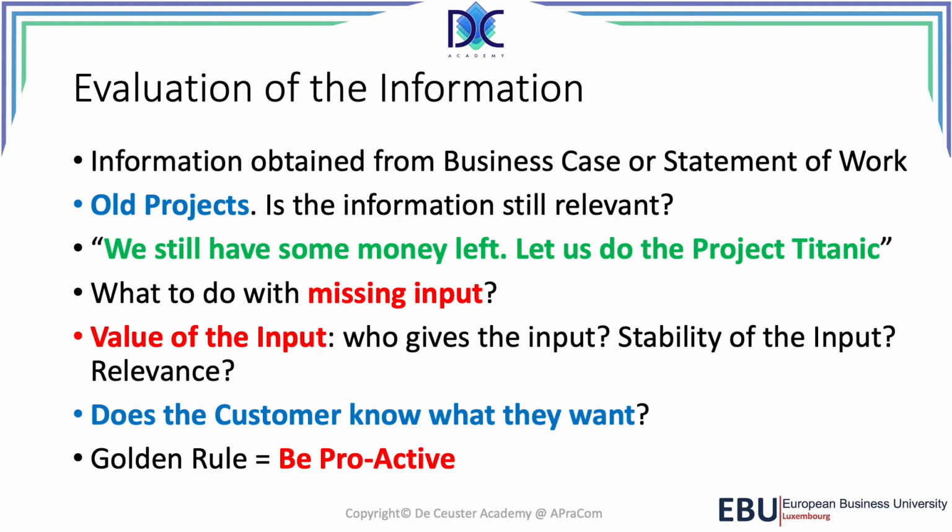Now, sometimes we have missing input, we need some input to start with the project. Many of my customers didn't give all the input necessary. The problem here was very simple. You just challenge them, you put there some information and you ask for their approval. Basically you make some assumptions about the missing input, and then they are obliged to react because they have to sign the document saying, hey, this is good.